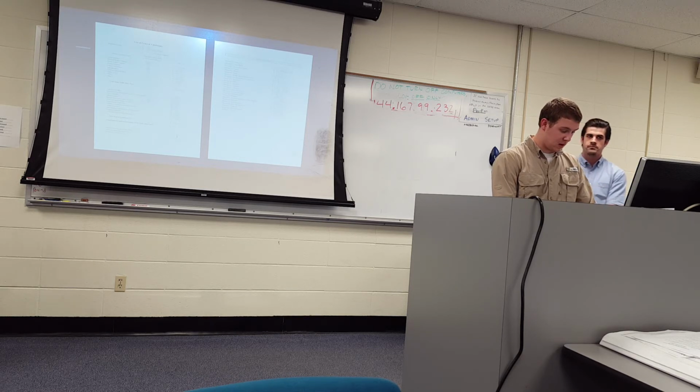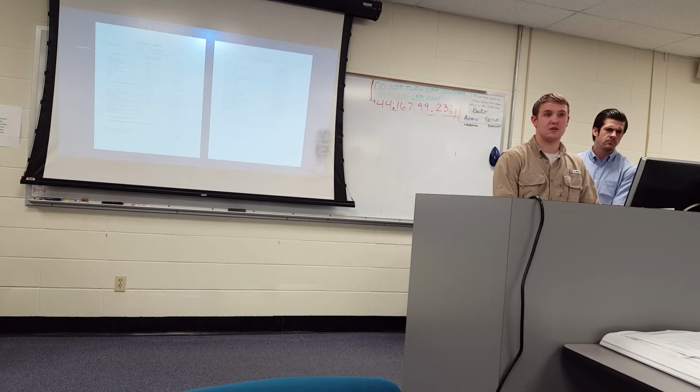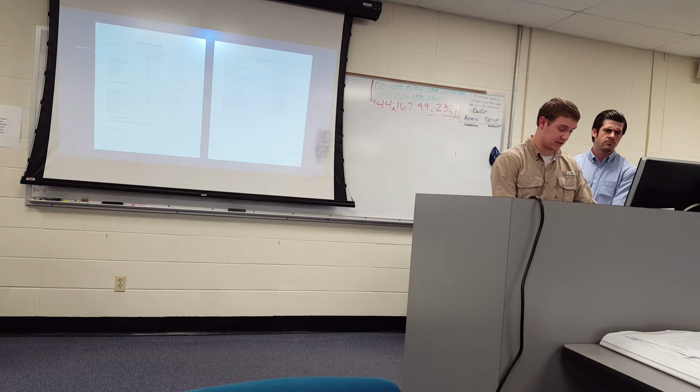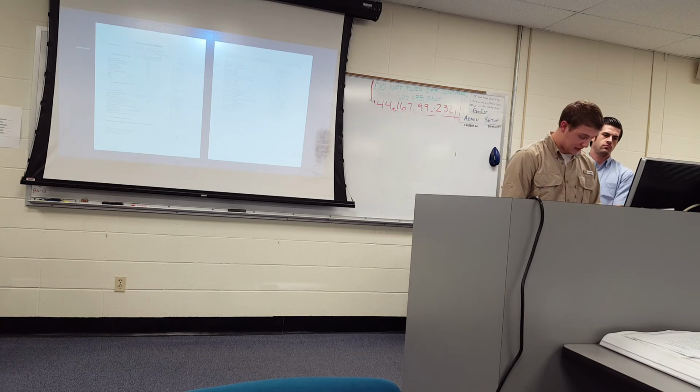Okay. Well, for our on-site and field office, we have come to a total of $182,000 for all of our employees, and that includes a project manager, assistant project manager, senior project engineer, project accountant, superintendent, and assistant superintendent. Total on-site field office staff does come out to $182,000, like I mentioned before.